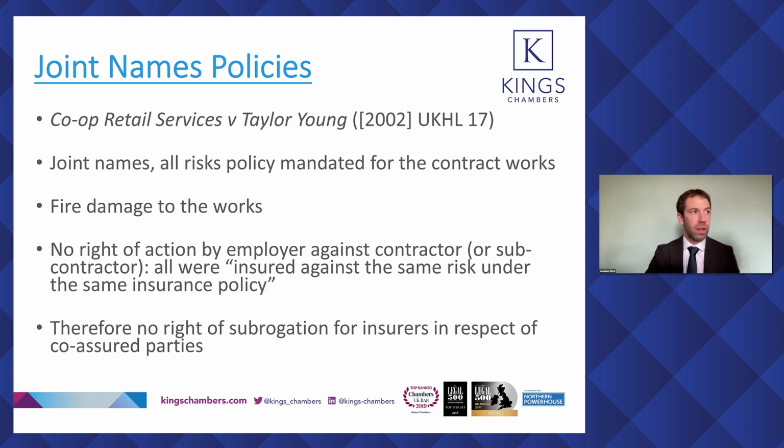And let's start with the CRS, Cooperative Retail Services and Taylor Young case, which is a House of Lords decision from 2002. It's not the first decision on this topic, but it's a convenient place to start. This was a building dispute. There was a building contract, JCT Standard Form 1980, which required the main contractor to take out a policy of insurance in joint names covering, amongst other things, damage by fire.